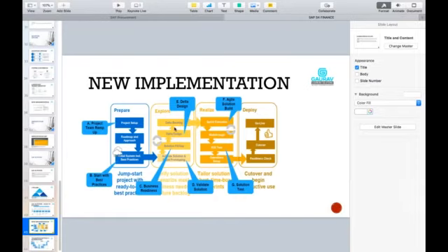You can see this process is also iterative. You understood the requirements, you created a document, the customer said no, there are some changes. So again you discuss the document, you create version 2, again the customer says there are a few changes, and again you go back. Finally, at one point the customer will say yes, this looks perfect, this is what I was looking for, now you can proceed with the development.